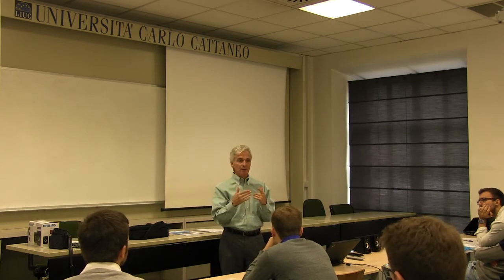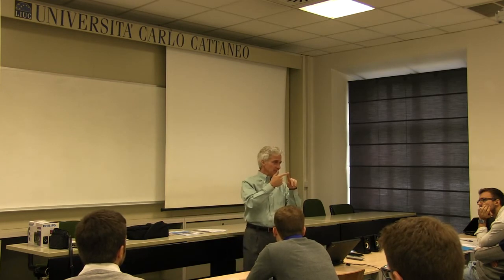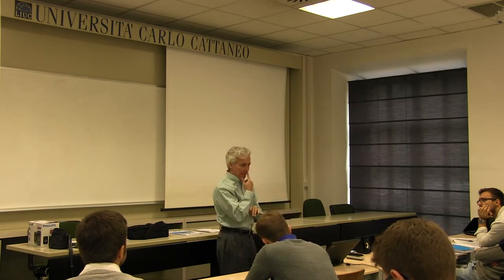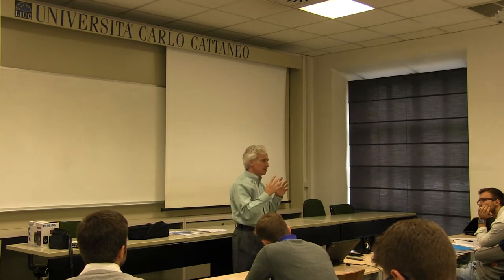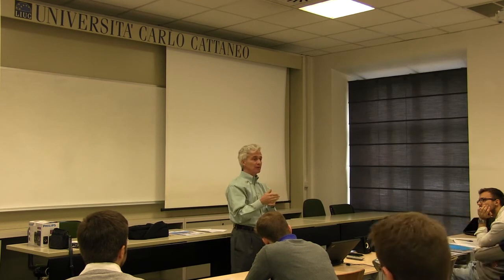I have a reservation for a flight on Friday. Let us say I finish my work early. Can I leave early? I have to wait. So even though there is no task dependency, I'm still constrained. So there are often constraints with respect to dates. So when you schedule, you must consider resource availability, task interdependencies, and date constraints. All of this plus effort, calculate duration.